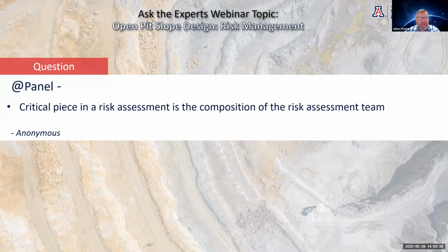That's a very good point, Eric. I used to run the risk assessments at mines, to try and steepen slopes. And you often find that some of the older, more experienced people are very loud, and nobody wants to have an opinion, because they might be judged by this person. I got around it by putting things to the vote, anonymous votes on little voting slips, so nobody knows who voted what. That was sort of an attempt to let everybody have a voice. It worked really well. It was just time consuming, but a good moderator will solve that too. Make the louder people a bit more silent, and make the silent people a bit louder.